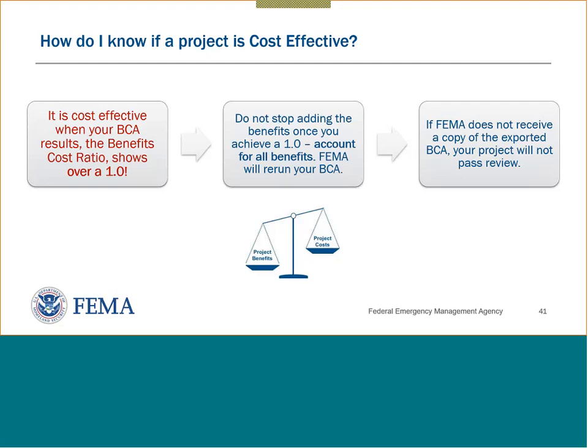What will happen at the National Technical Review, if you can't support a data entry point at the review, they'll turn it to 0. So you can just imagine that you can't change too many data inputs to 0 and have a positive benefit outcome for your BCA.